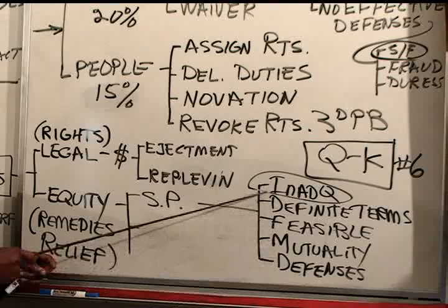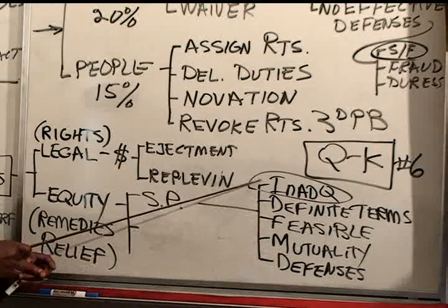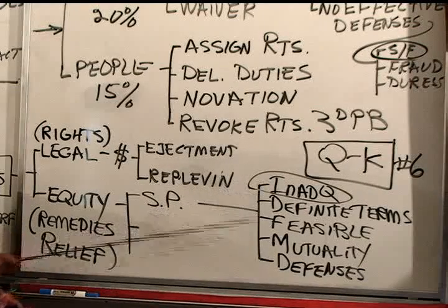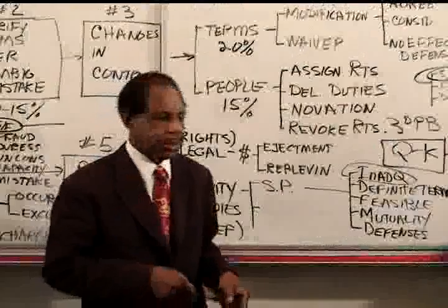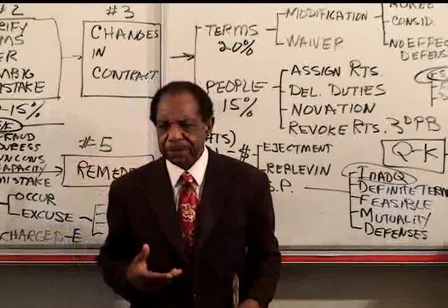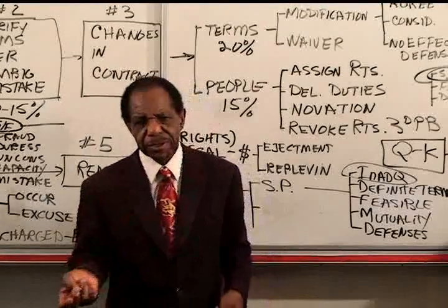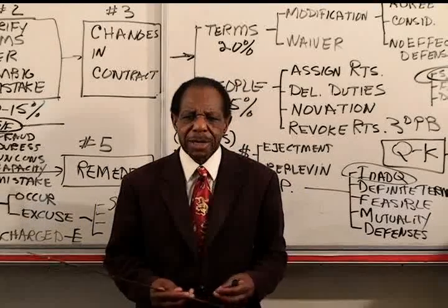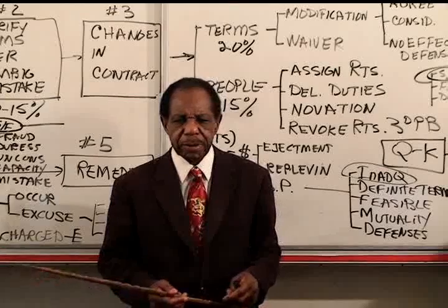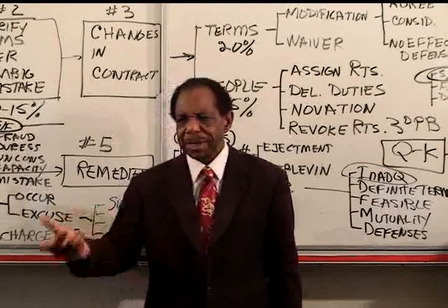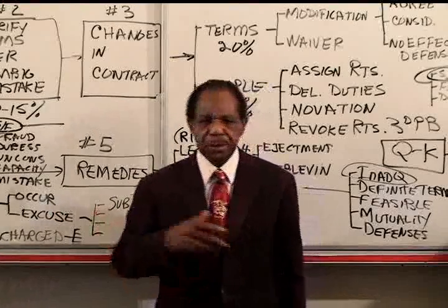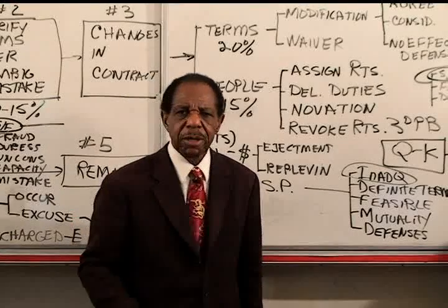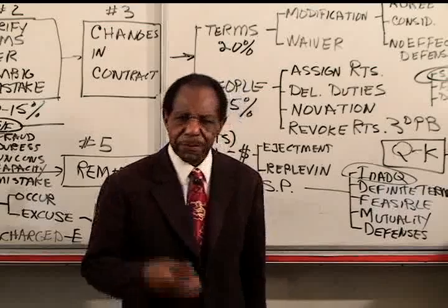There's nothing, you have to fill these in, but the real problem here where you'll get substantially more points is if you dig in here at whether or not the remedy at law is inadequate, because buyer is building a plant for Carlson, and he's got a schedule to finish, obviously, and you've got to make some arguments here that getting things late, usually when people are building stuff, is a big deal and messes up their schedules, etc. May have to lay people off work, and he told them February 15th was essential, the very critical date.